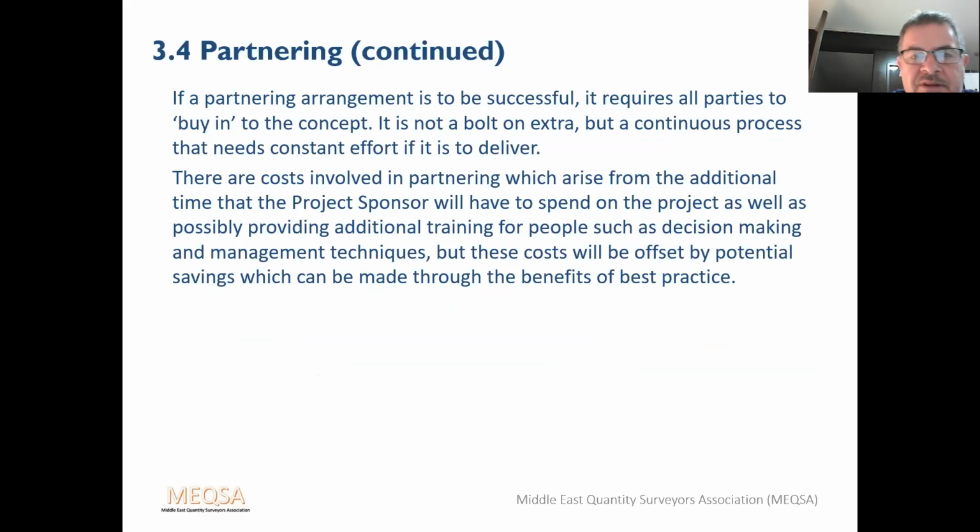If a partnering arrangement is to be successful, it requires all parties to buy into the concept. That is essential. If one party does not buy into it or loses faith, it will not work. It's not a bolt-on extra, but a continuous process that needs constant effort if it is to deliver. There are costs involved in partnering which arise from the additional time that the project sponsor or rep will have to spend on the project, as well as possibly providing additional training for people such as decision-making and management techniques, but these costs will be offset by potential savings which can be made through the benefits of best practice.